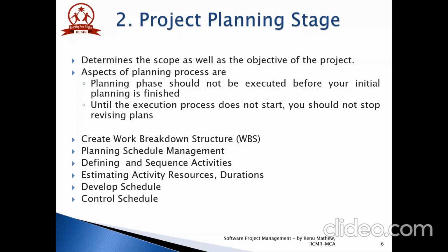Further break down your top-level WBS into a hierarchical set of activities, for instance, categories, subcategories, etc. Or it can be like hardware, software, training, management teams, like that also you can have your WBS created. Define how to record the items into your WBS. Decide on granularity, how detailed your tasks should be. Granularity should be of the right level, not too high or too low, to make cost estimation easier.